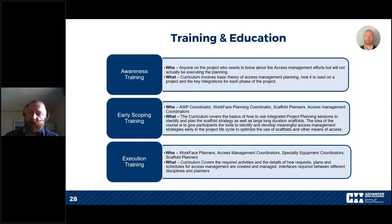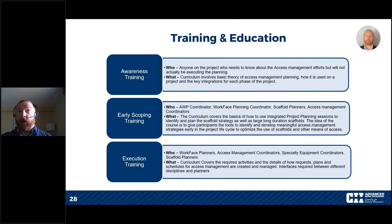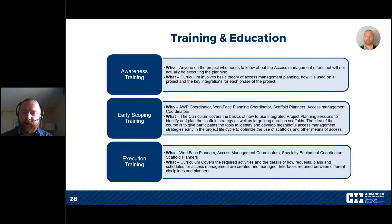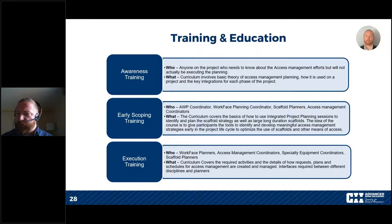Execution training is for when you're in the field — covering work face planners and the people managing scaffolds in the field. The goal is to get away from the one-to-one reactionary approach. This training covers how work face planners create their IWPs and request scaffold, how the scaffold coordinator collates all that information, and produces realistic, multi-disciplinary, efficient scaffolds that support all of the trades. To implement this, you need to educate people on their roles and be able to speak the language clearly in a way that supports what they're going to do on the project.